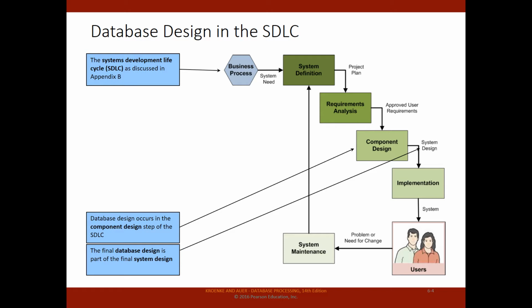So you were able to allocate resources in terms of labor, and if you chose to allocate also costs, you were able to do that as well. But you were able to allocate cost or allocate labor, and you allocated also time. And then you decided which task needs to be preceded and the sequences of those tasks. And then you actually came up with a Gantt chart using Microsoft, or you used project software.